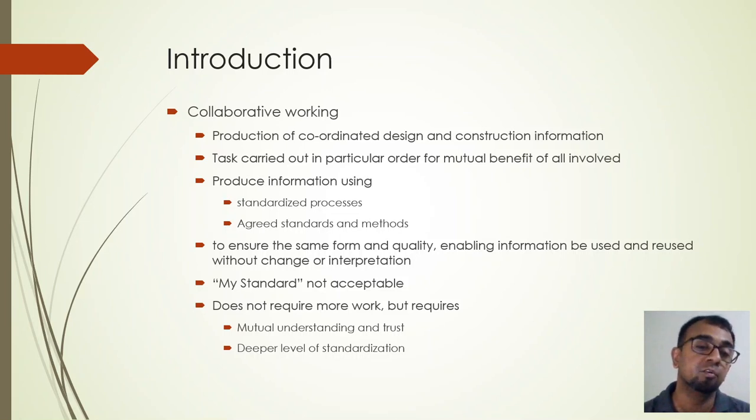Now, how you should interpret this is, we know that when we are working with BIM, we rely on information that is produced by various others, and if this information is not provided on time, at the level that is required, then the next party cannot perform their task well.